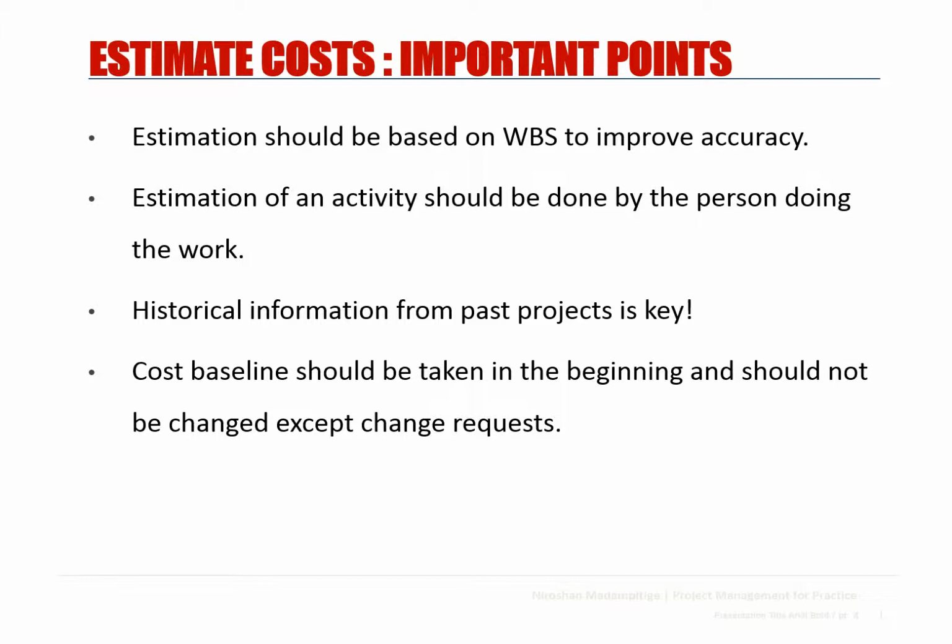The cost baseline should be taken in the beginning and should not be changed, except for a change request. The baseline needs to be kept the same, because baselines represent the initial planned values of a project, in order to make measurements for various analyses in your project and then take corrective actions.